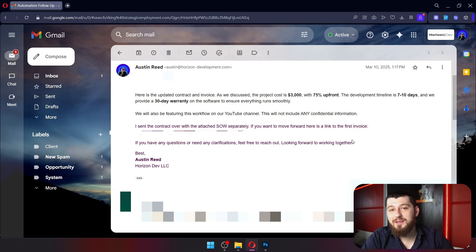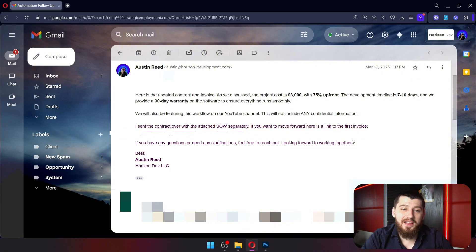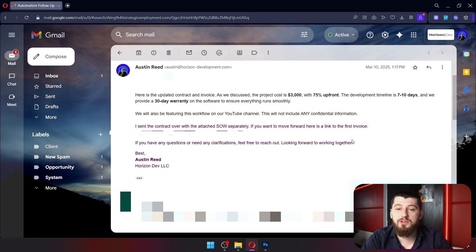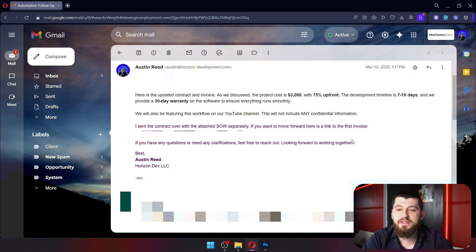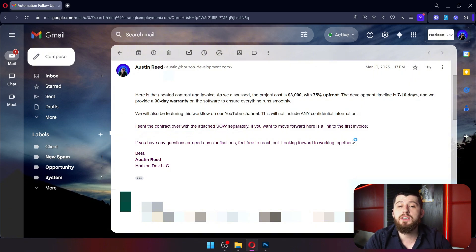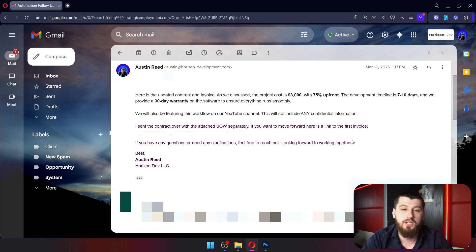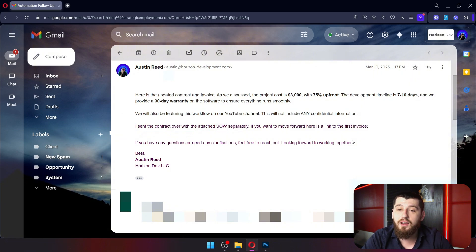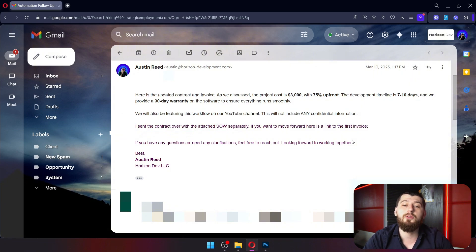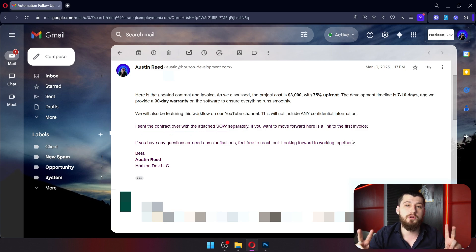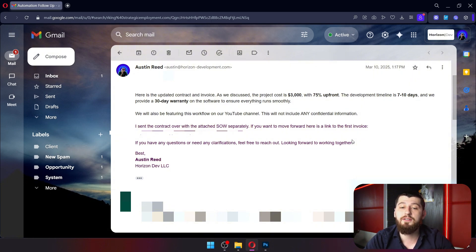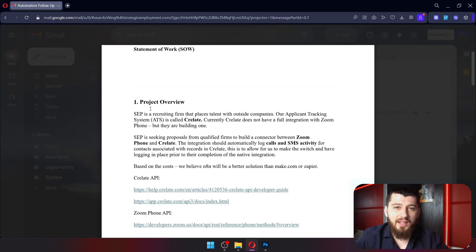Here's a sample of an email that you might send: Hey friend, here's the updated contract and invoice. As we discussed, the project cost is $3,000 with 75% upfront. The development timeline is 7 to 10 days and we provide a 30-day warranty on the software to ensure everything runs smoothly. I sent the contract over with the attached SOW or scope of work separately. If you want to move forward, here's a link to the first invoice.